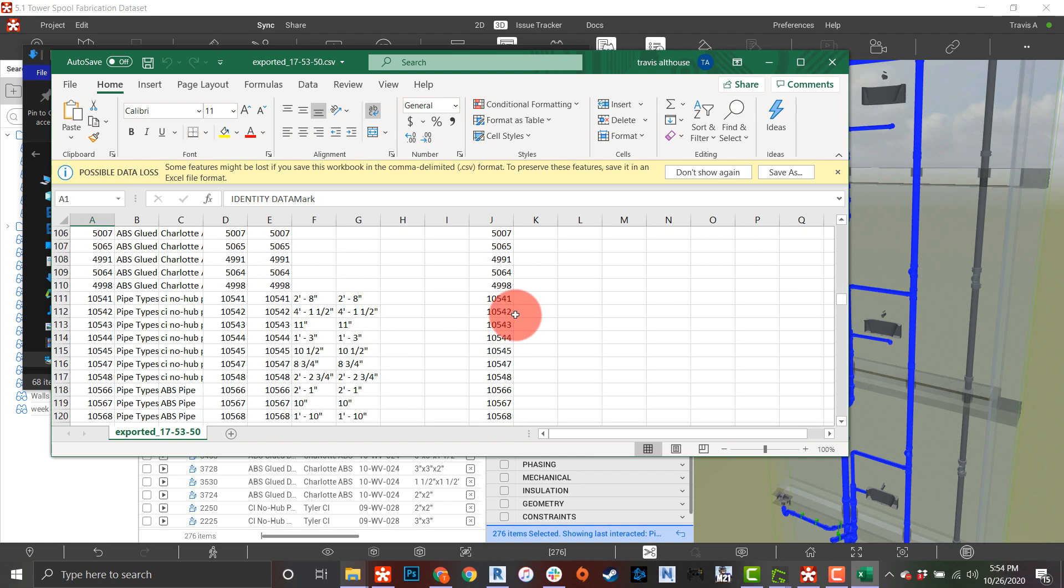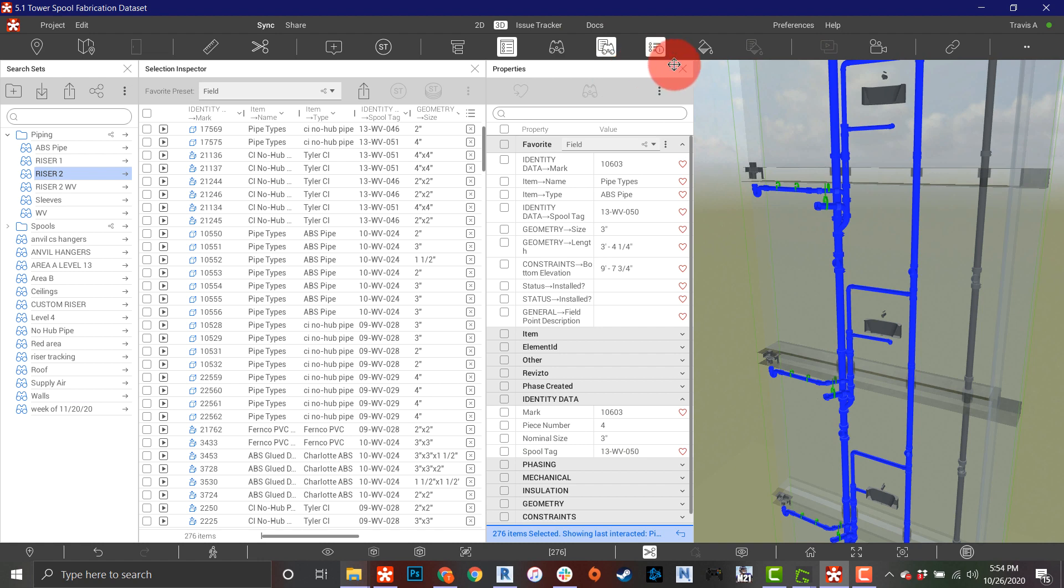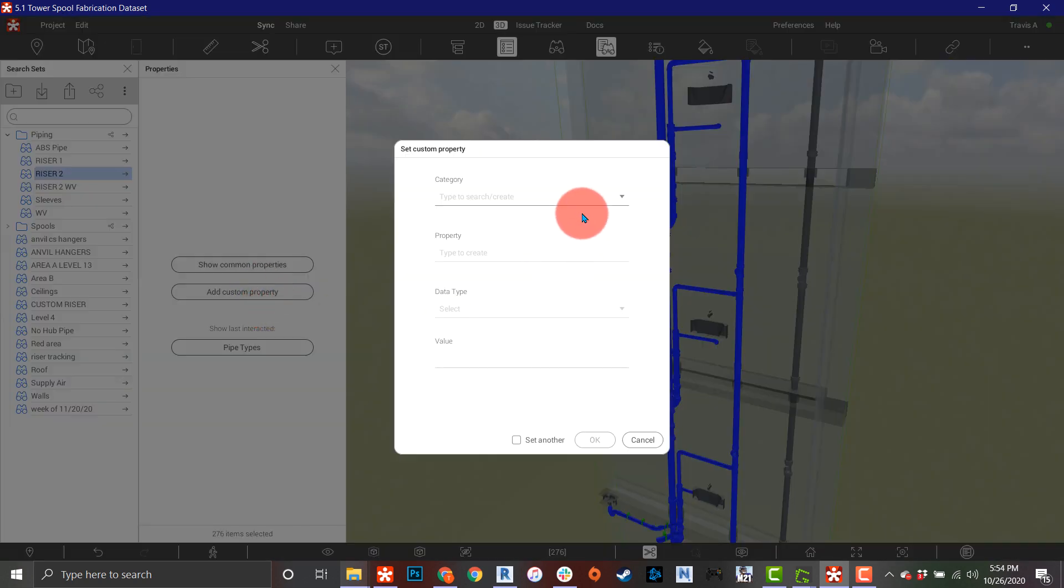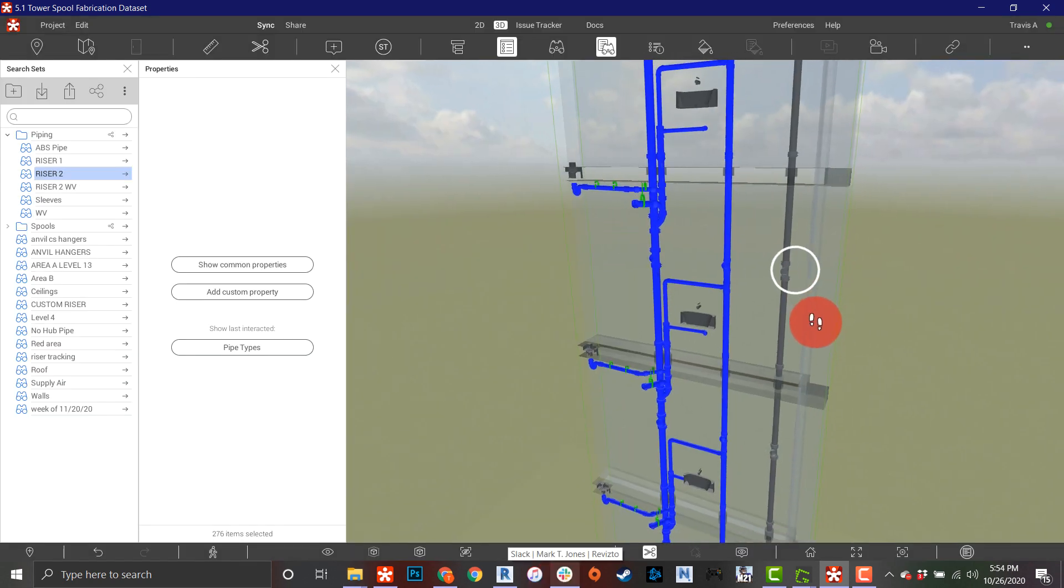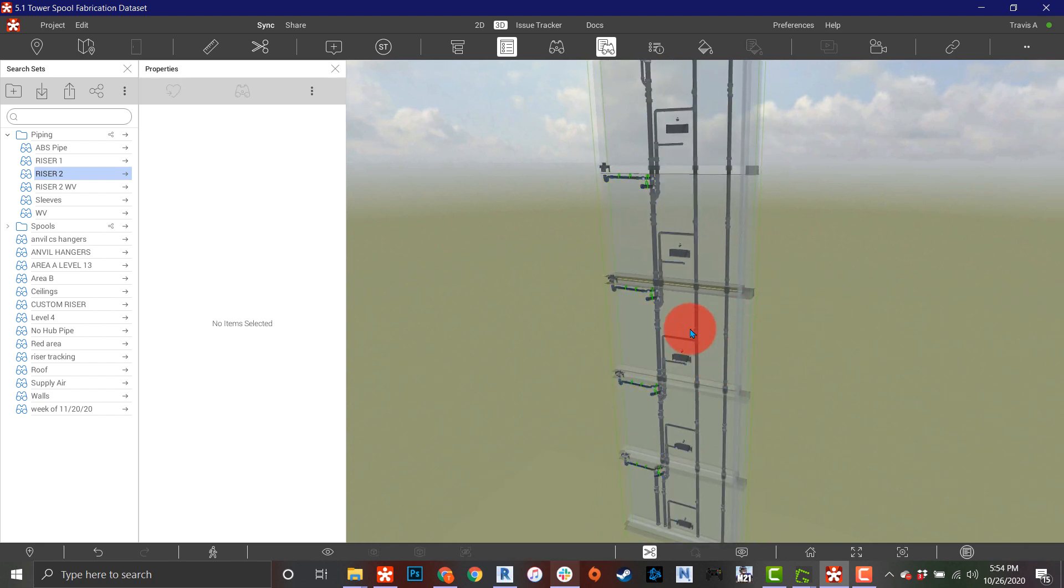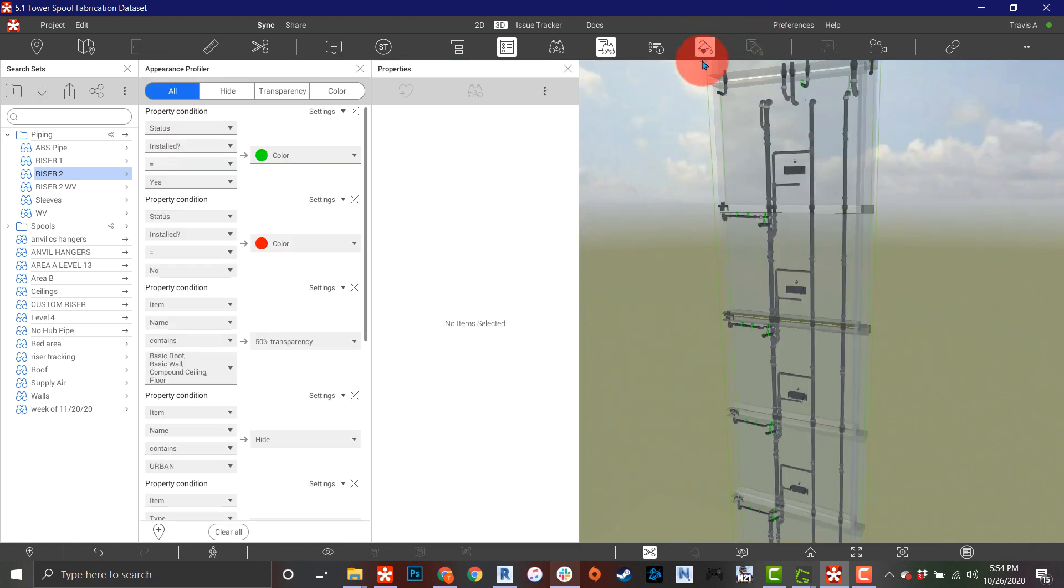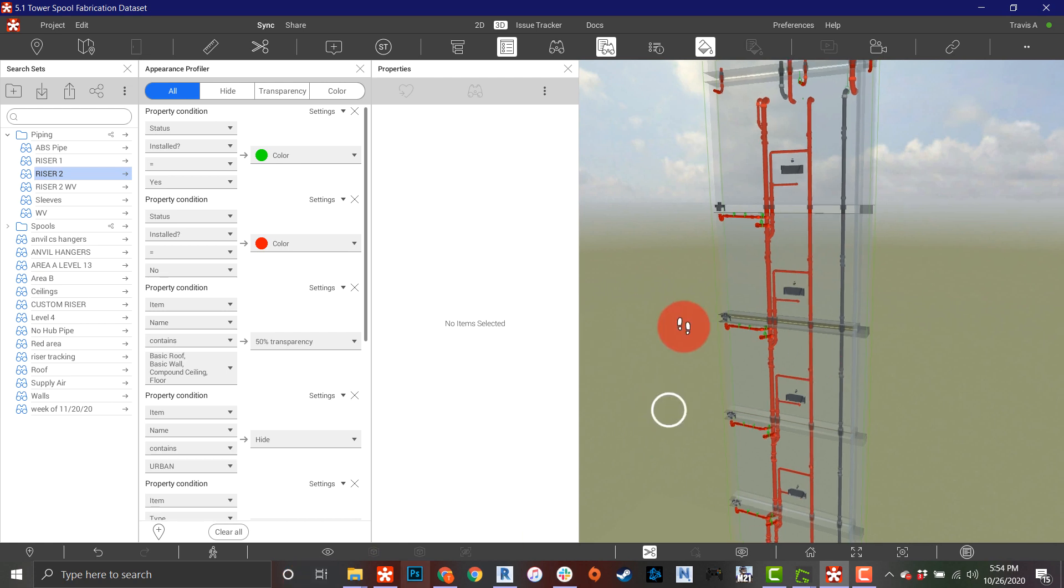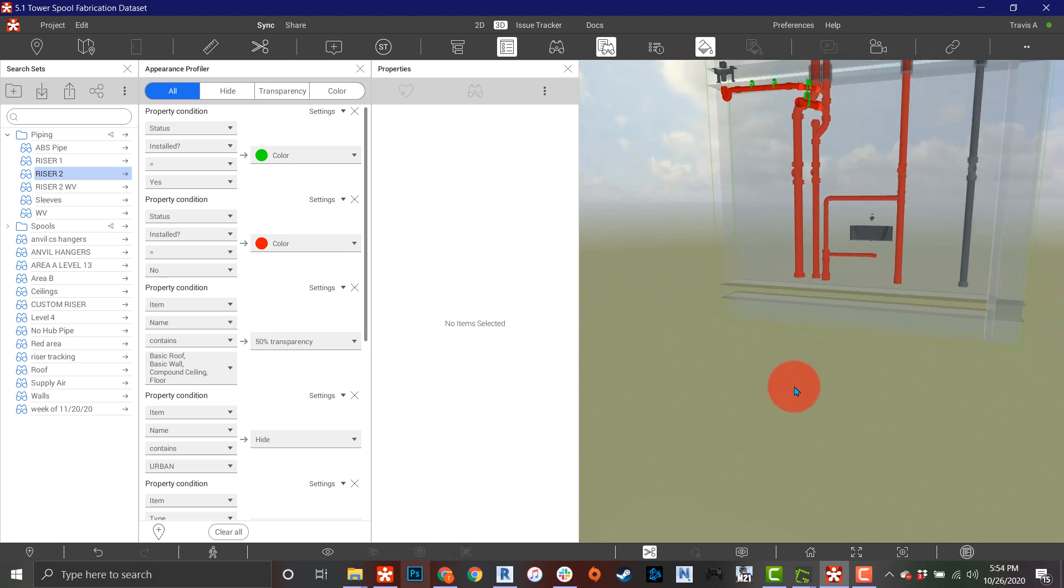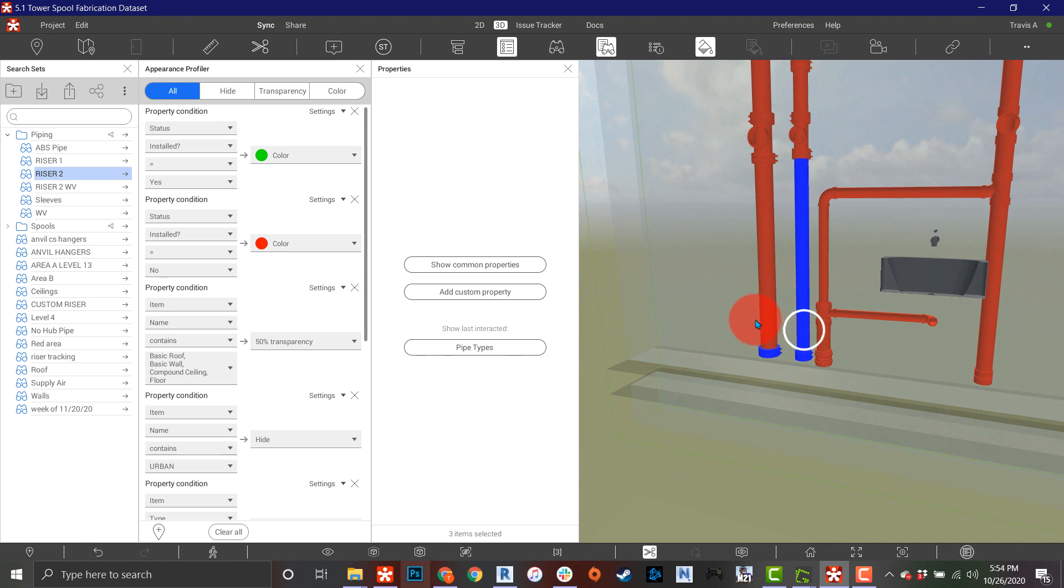The really cool part about this - now that we have that defined, I'm going to come in here and add a custom property to all these parts I have selected. I'm going to say custom property status: installed. I've been doing a boolean type which gives you just yes or no. I'm going to set this all default to no, so now all of those pieces and parts have a custom property that says it's not installed. I'll be able to come in here and if I just tweak one of these colors real quick, I'll be able to run my appearance profiler and I just quickly turned everything that's not installed red.